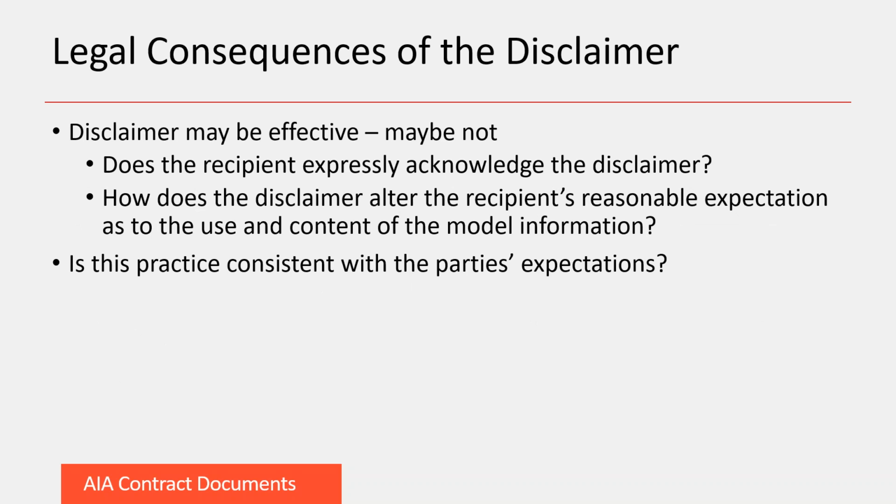So with regard to modeling, there's a question as to whether or not a blanket disclaimer is really going to be effective. Because at the end of the day, if there is an underlying expectation that the recipient of the model is going to be using the model for some specific purpose, and the provider of the model understands that the recipient is going to be using it for a specific purpose, like cost estimating or actually building the project, then simply providing a disclaimer that says, oh, by the way, you can't use this for anything, may not be as effective as you might expect, particularly as effective as it was in the old environment, where oftentimes the CAD drawings were given to the owner at the end of the construction process. So that's the first thing.